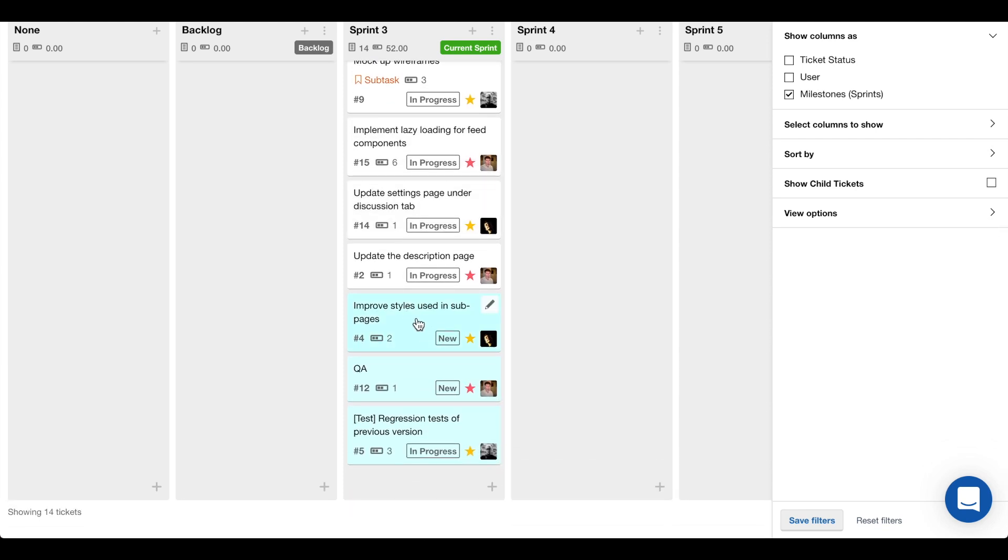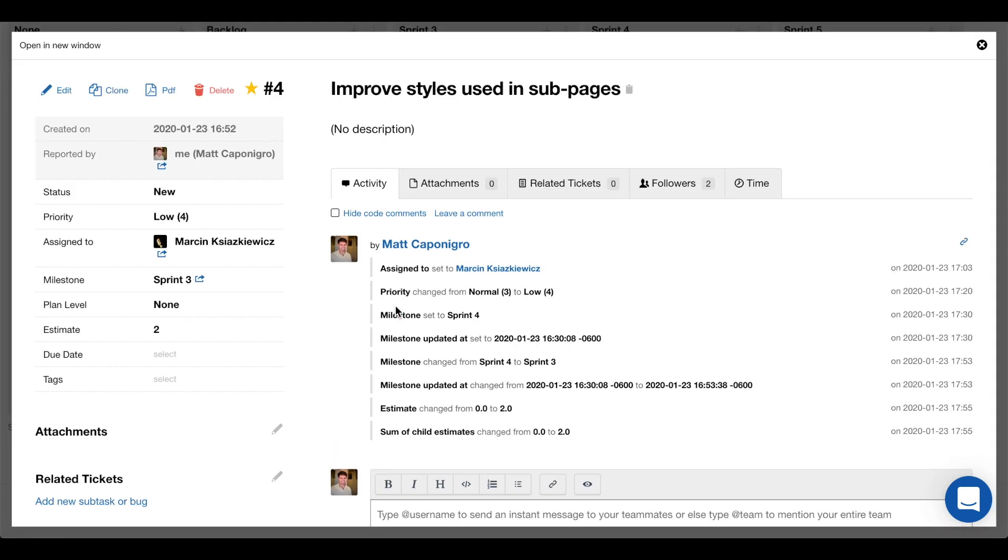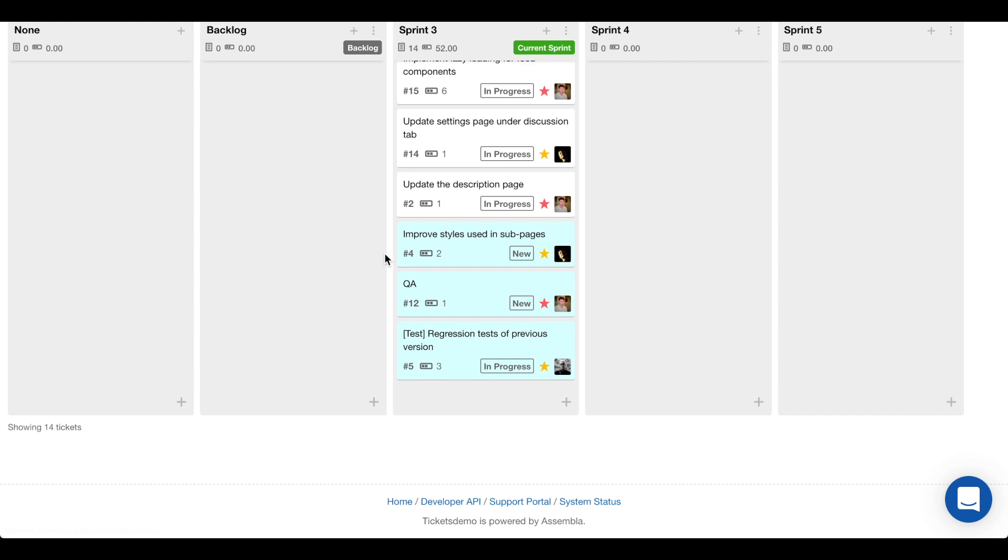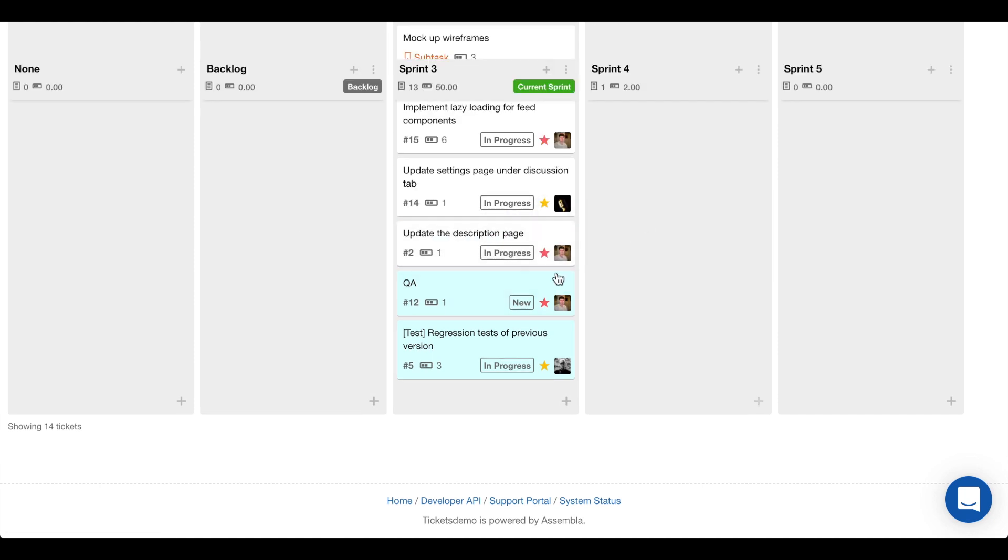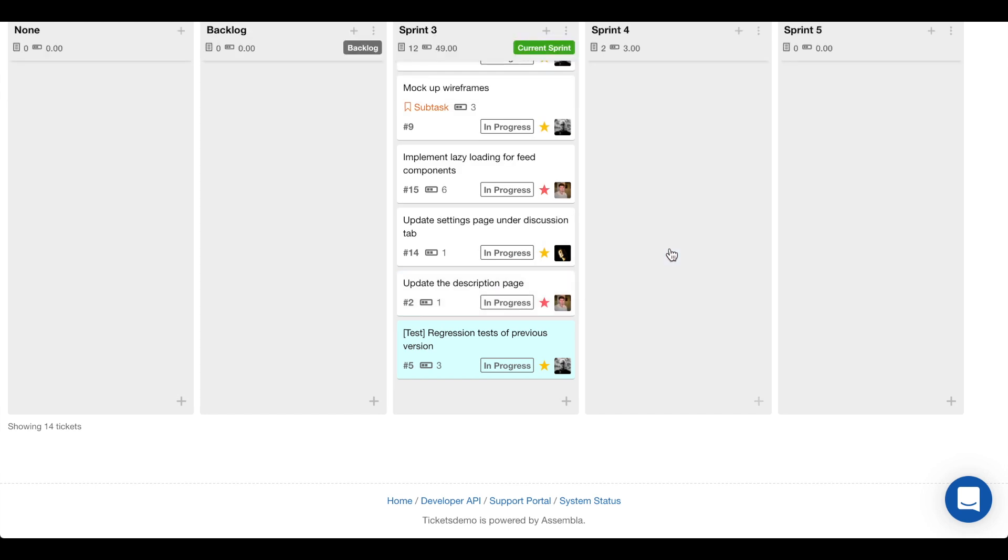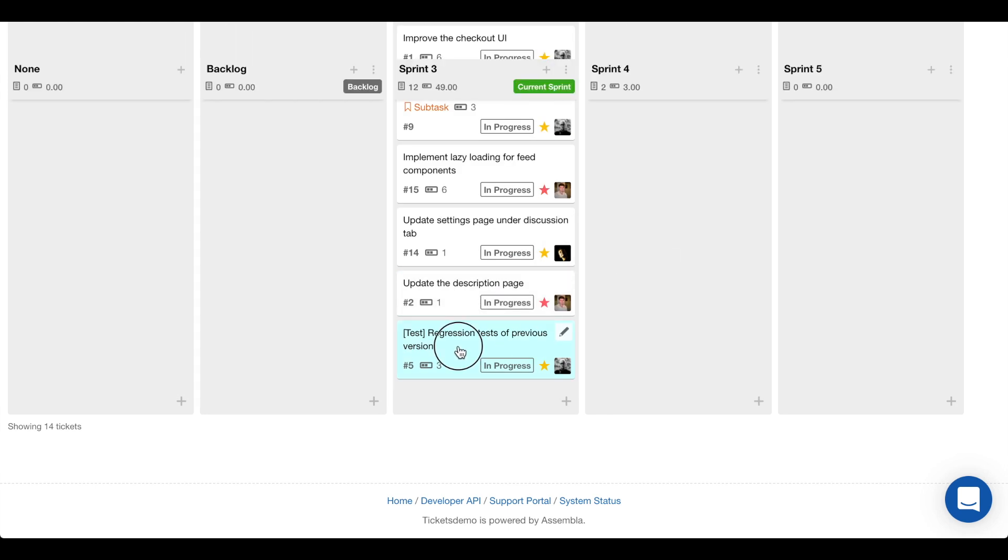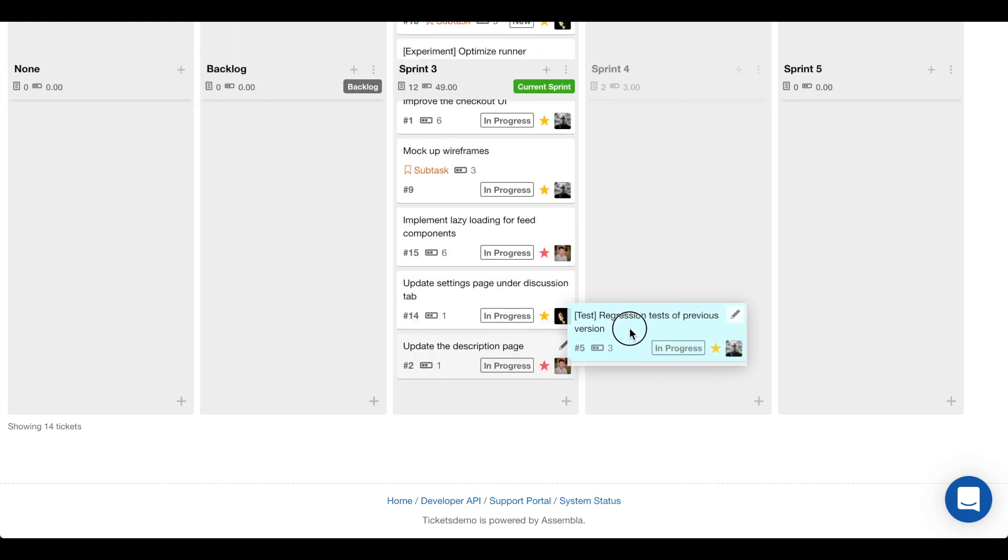So these tasks that are highlighted in blue are actually given a priority of low. So maybe what we want to do is move the tasks that have low priority over into the next sprint.